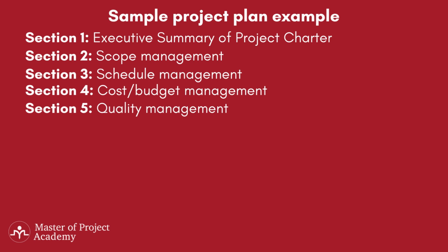Example: an information system that controls the level of consistency for screen layouts would normally contain a full review of all available screens, thus making sure that these screens match the originally agreed set of quality standards. In many cases, quality measures may include a condition of no defects for certain requirements the company deems critical, while in other cases, quality measures may require consistent screen layouts and/or correctly calculated variables.